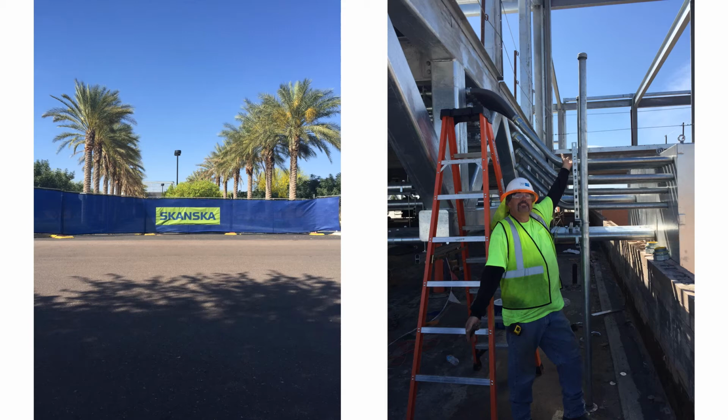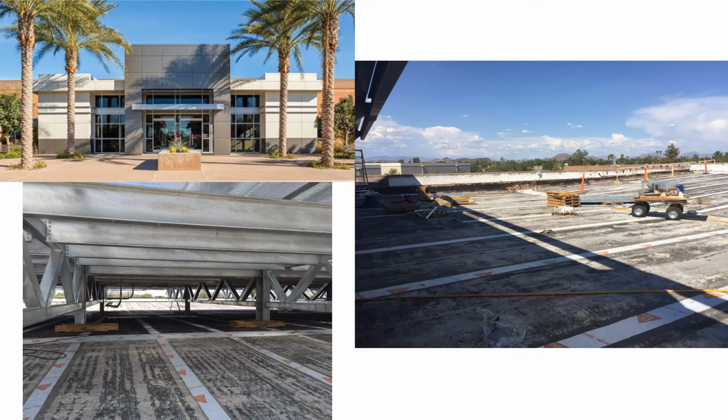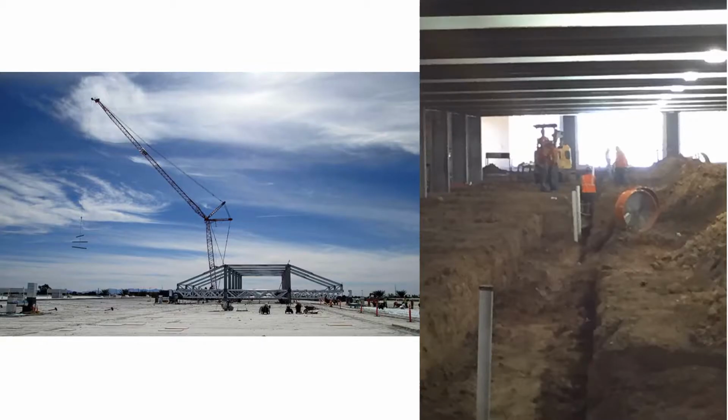Therefore, there were no bids on this project, leading me to believe that it was a cost-plus-fee contract. The owner was more focused on the quality of the building and getting what he wanted than on the cost. That being said, there were times when construction was delayed because funds had not been released yet. Estimating was done for the subcontracts so we could tell who was giving us a real price and who was trying to take advantage. I think it helps to have a superintendent that knows about specific trades.